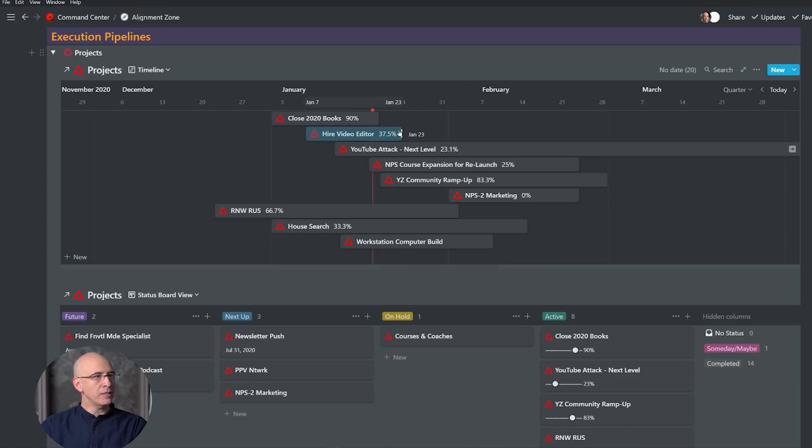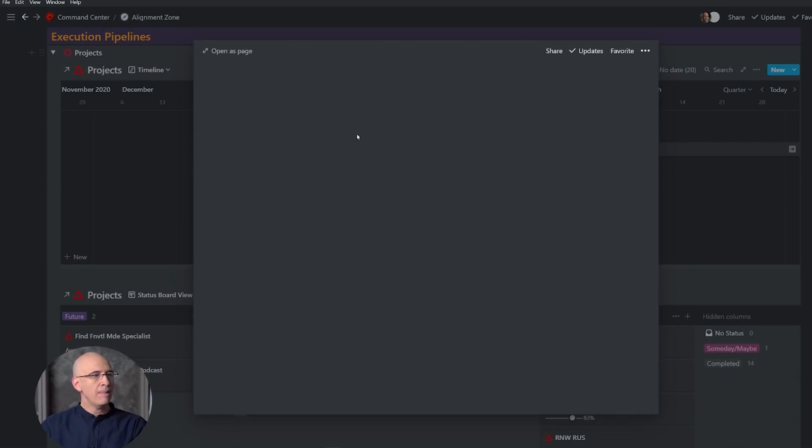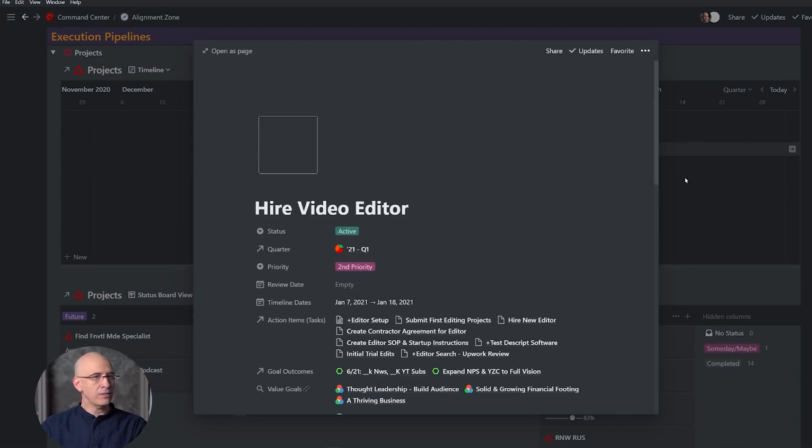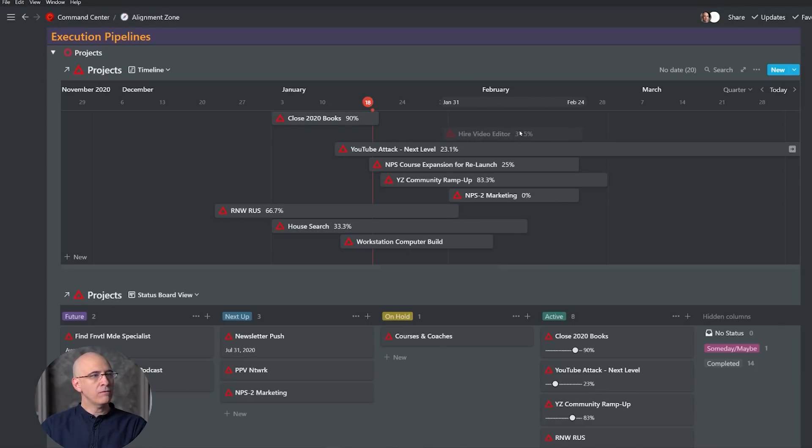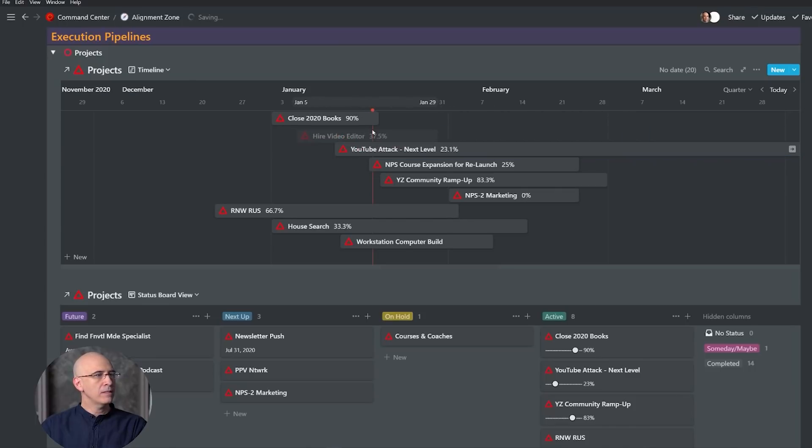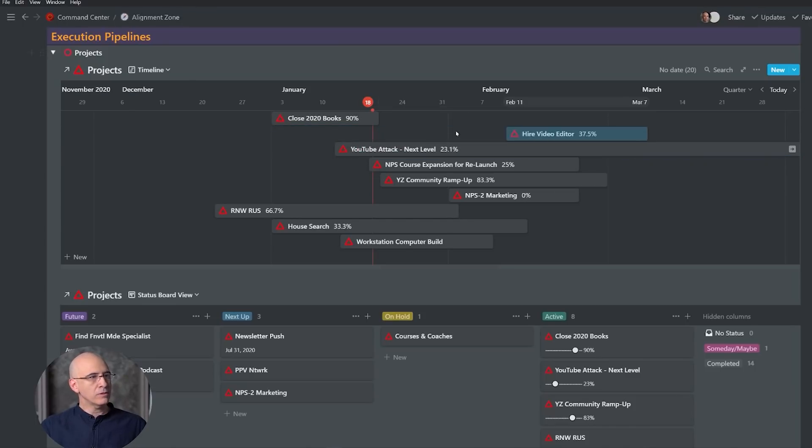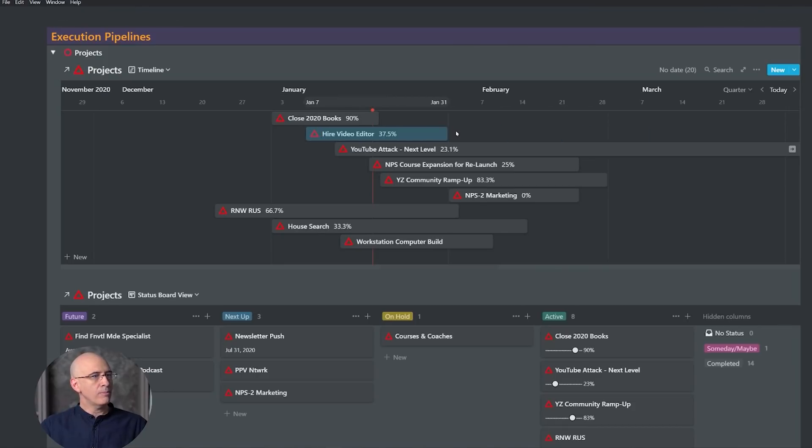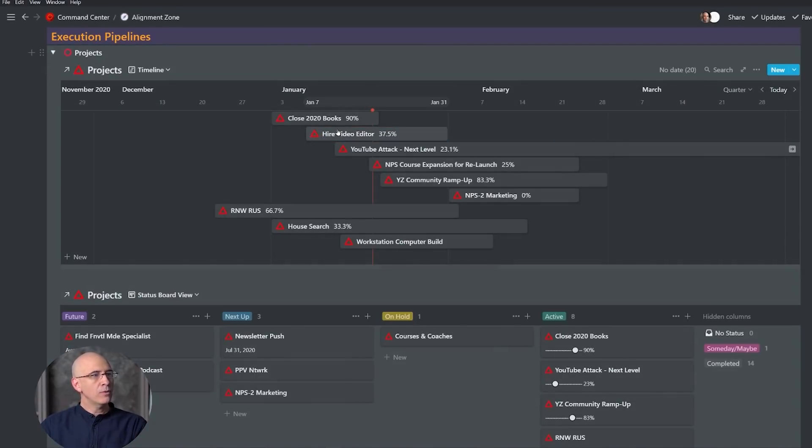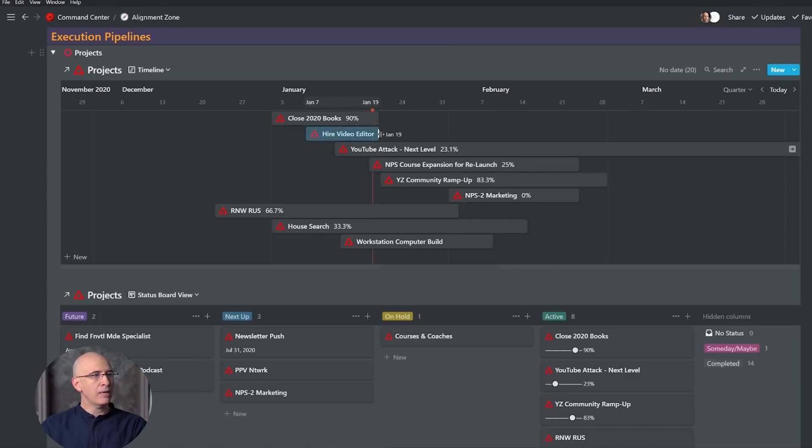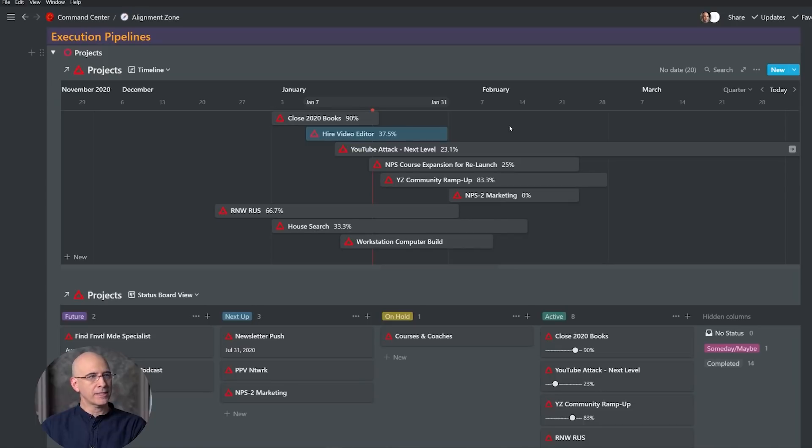The beauty of this is once you set it up there, you can very easily change it. You just drag this and the end date's changing. So we just changed the end date, and now that of course adjusts here. You drag the whole thing forward, it'll position that anywhere you want it. If you Command Z or Control Z, of course it'll go back to where it was. So once you have it set up, you're constantly adjusting and tweaking just in the timeline view itself by dragging and dropping the endpoints of these various project listings.